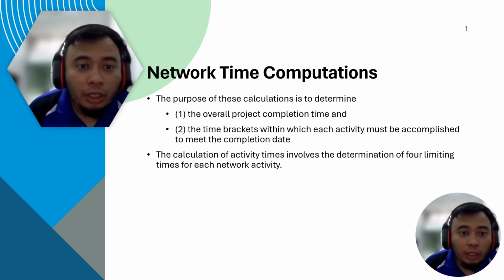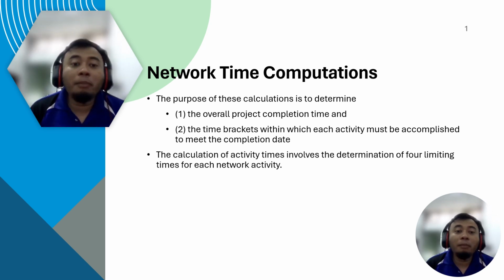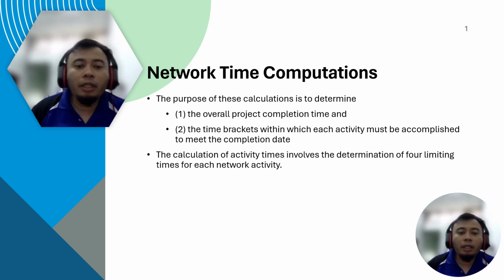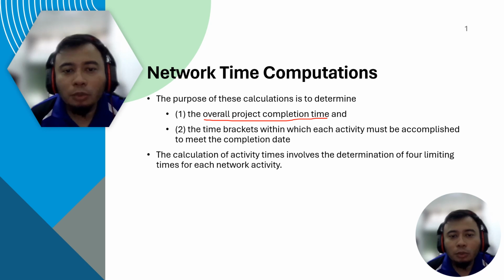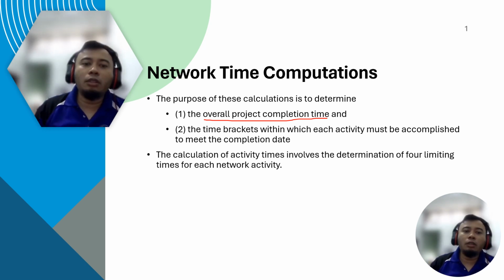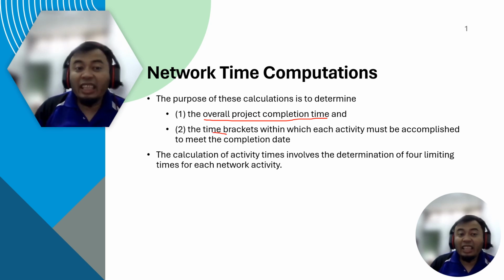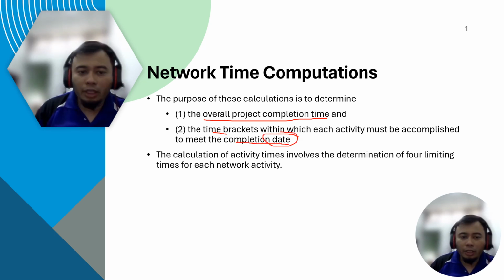So, network time computation. The purpose of this calculation is, one, to find the completion time. This is basic: you want to know how many days are needed to complete the project. And the second one is the time brackets within which each activity must be accomplished. So you want to do the early start, early finish, late start, so that you can achieve the late finish date. You are more concerned about the date.